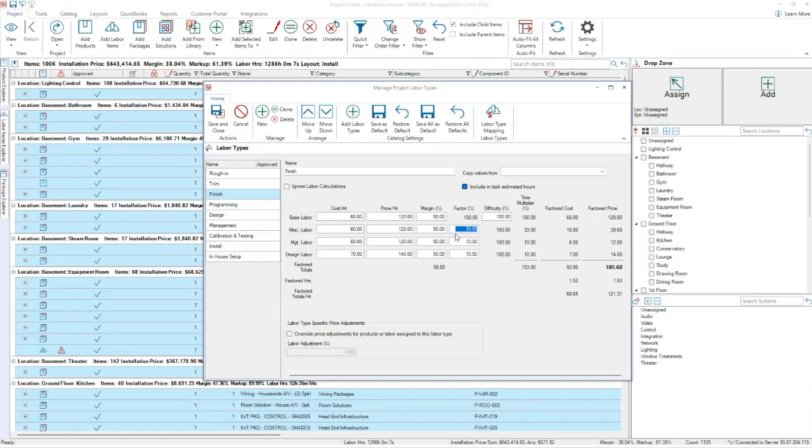It suggests that I can get 6 hours of production time done in a day, and about 2 hours of non-production time. And so this setting will automatically generate an 8-hour budget every day, where 6 hours is production and 2 hours is this miscellaneous labor. And then I might do a similar calculation to think about things like management and design. So these are an interesting concept.